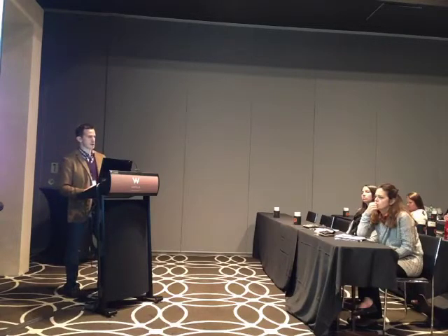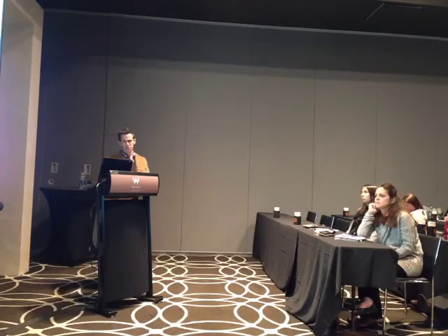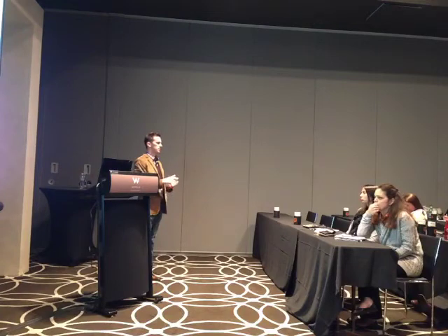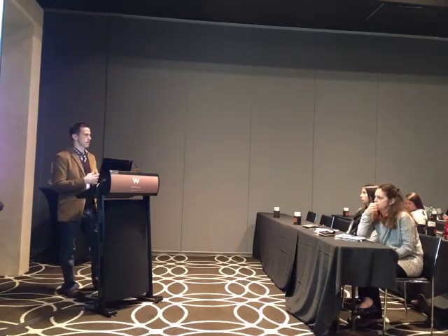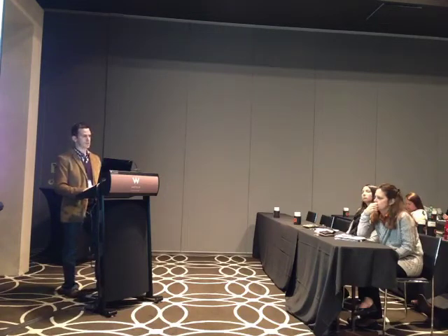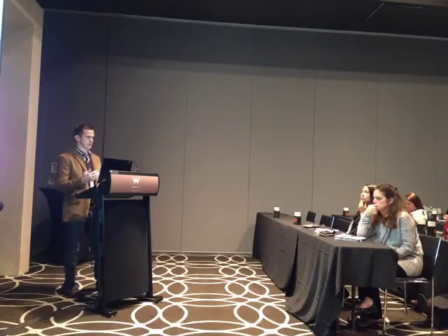And then we're able, as project managers, to go in and select resources that we would like to work on our papers, or on our requests. So I've had Pratt work on the last 2 papers. It doesn't make a whole lot of sense ramping up a whole new creative person, and maybe the creative manager doesn't know that. So we put in resources that we request. That doesn't necessarily guarantee that we get that resource. They may be on a pitch or on another project and not have time, but we're at least able to put that request in, and then we can also add notes in terms of that person's work on this, and why they would be a good fit.